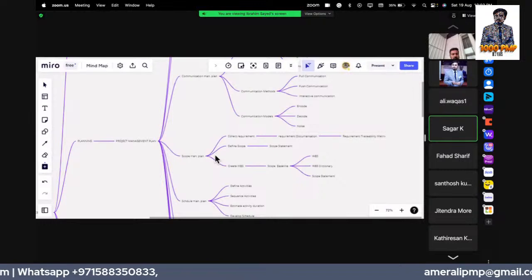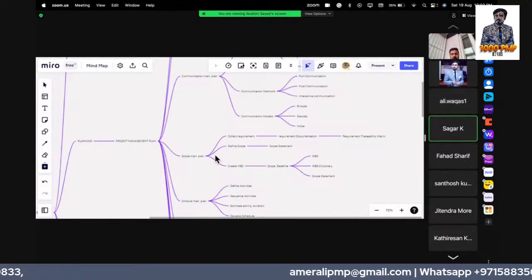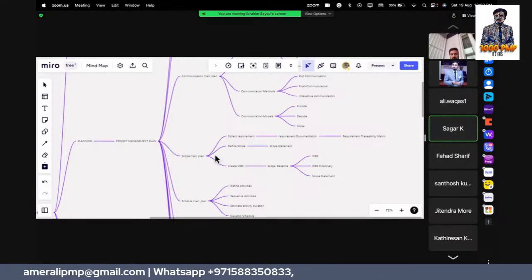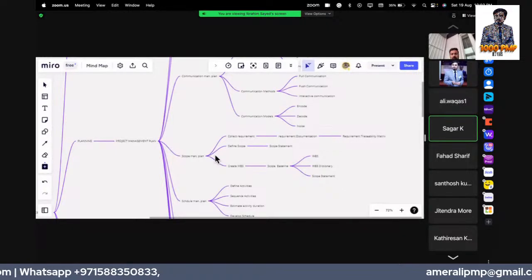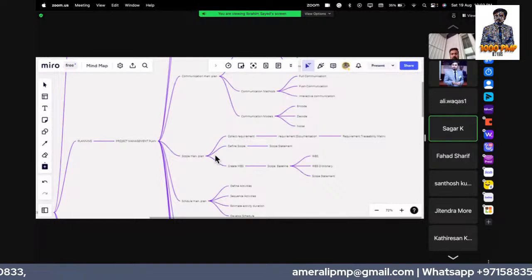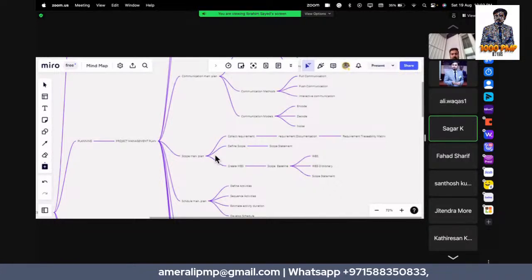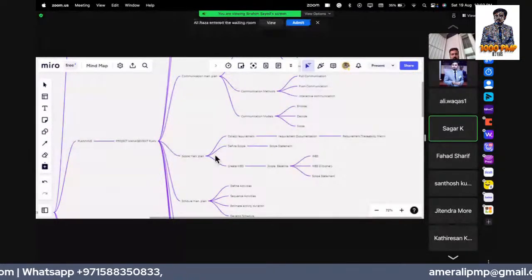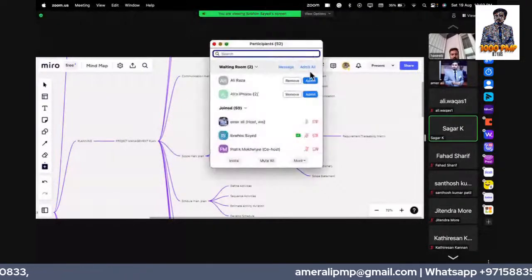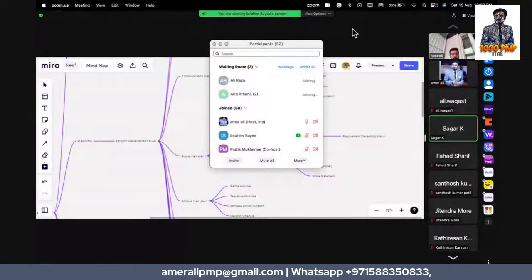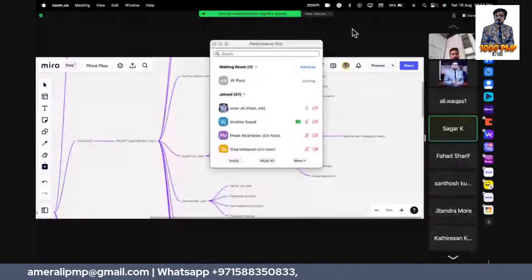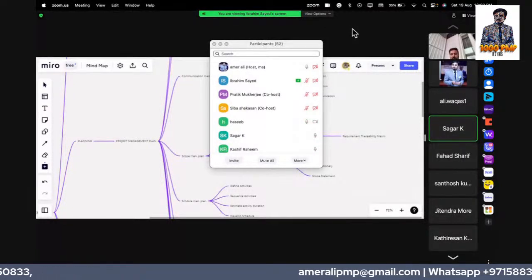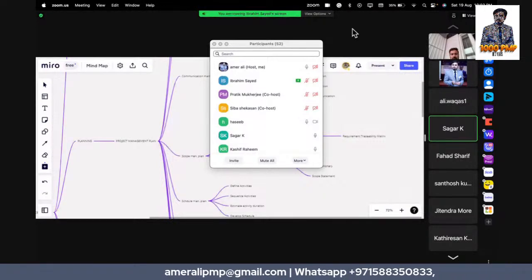The tools used for collecting requirements are expert judgment and meetings. The outputs of collect requirements are the requirements documentation and the requirements traceability matrix. Out of the requirements documentation, we define the scope, and the output of define scope is the scope statement.